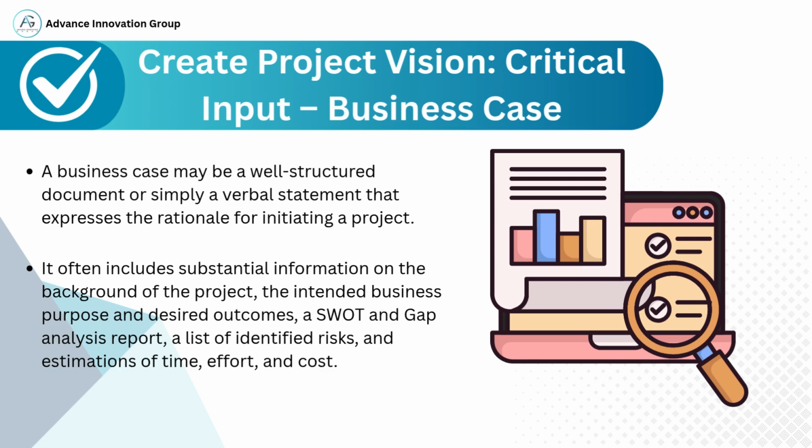First, it provides the background of the project, including how the idea originated and what problem or opportunity it addresses. Then, it outlines the intended business purpose and desired outcomes, which help to define the value the project is expected to deliver. In many cases, a SWOT analysis (strengths, weaknesses, opportunities, and threats) and a gap analysis are also included to support the case further.